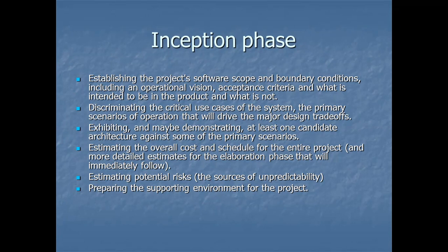In this phase, we are also going to exhibit and maybe demonstrate at least one candidate architecture against some of the primary scenarios. We are going to prepare the supportive environment for the project. In the inception phase, we gather the requirements, set the boundary conditions, and model some design for those basic requirements. Okay, this is the inception phase.